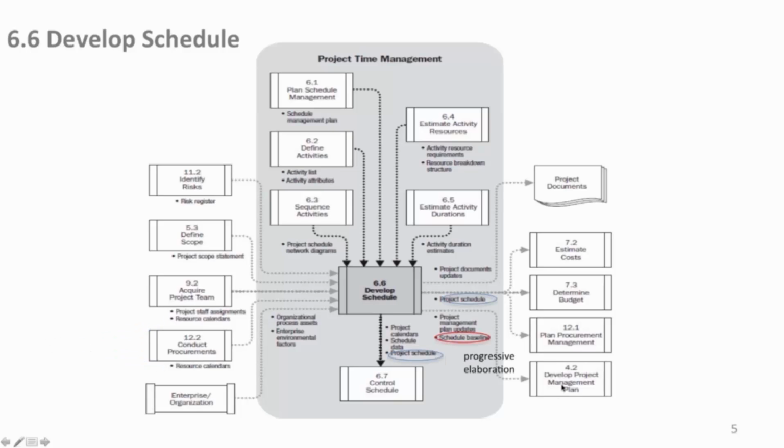So yeah, project schedule, schedule baseline. Oh yeah, I should mention that the schedule baseline now is a product of the developed schedule. I mentioned this earlier. Here's project schedule, as we said, goes two places, out internally and externally there. And the schedule baseline is at any point in time, if you baseline your project schedule, you're putting in actuals as you go along. Did you do this? Yeah, I'm 10% complete. Okay, fine. I put 3 hours on that. It takes 10. Okay, you put 3, partially complete. Your project schedule is a living document.